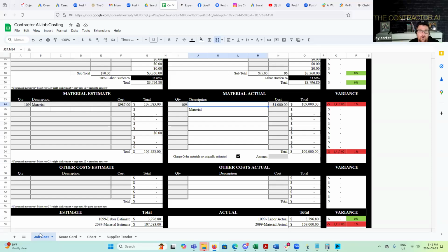So leverage these things. If I want to build a business on cash flow and I want to be smart about it, and I'm working with a higher clientele, do you think they care about paying you all the material up front? No. The second material's there, I pay. Boom, done. You can even set it up without negotiating the 1%. You could just make that part of your contract: the second material hits your job site, I want 50%. Easy enough. I just took 2% to my bottom line on my material.